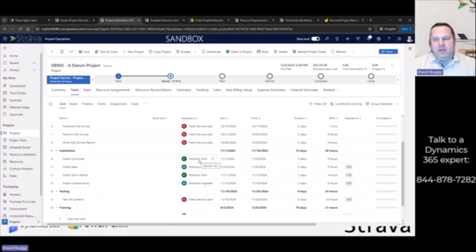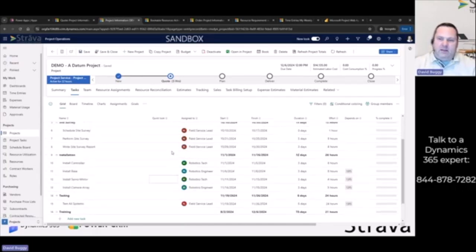Okay. But you do see that effort over here is probably the biggest thing, because we also have no idea really when this project is going to actually take place. So we put maybe arbitrary dates based on the date the customer is telling sales they would like the project started and finished. Those will likely change before it actually gets into delivery mode. But you do put in the effort in terms of hours, and that's important, because that's what's going to pull in pricing for labor and the cost. Okay. So I built this all out. We're going to come back to this.